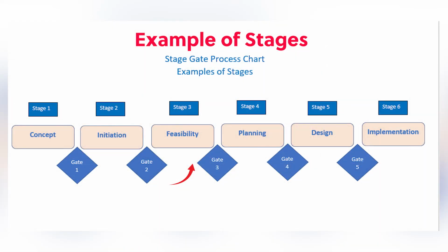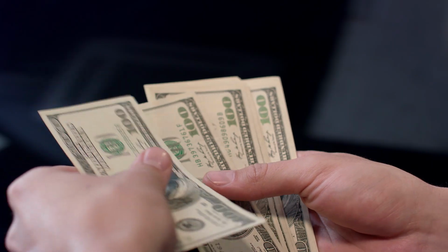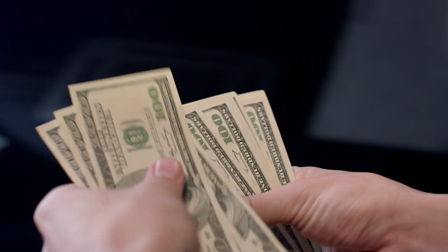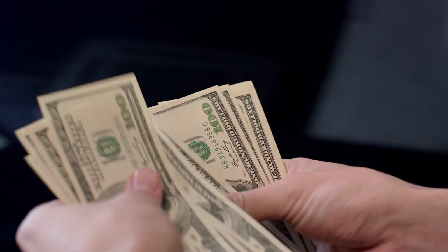So for the stage gate, your input would be your feasibility report or options analysis report and a revised project charter. The output, as the other stage gates, would be the approved deliverables. So you'd have the approved feasibility report and the approved project charter, and the funds would be released for the next stage. Now that's hopefully, because sometimes the funds aren't released.